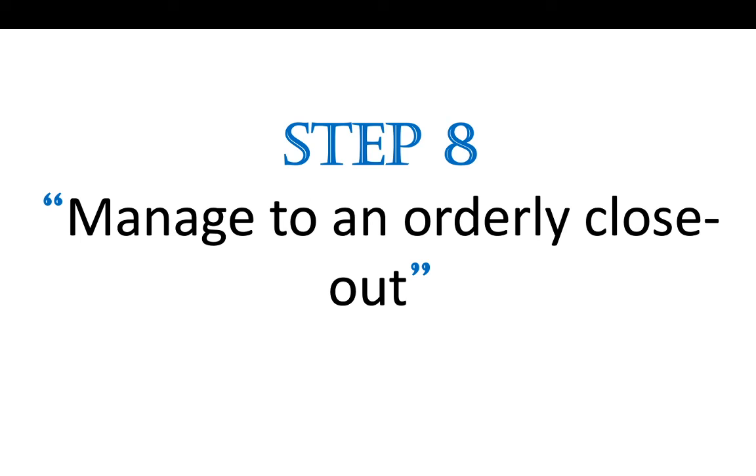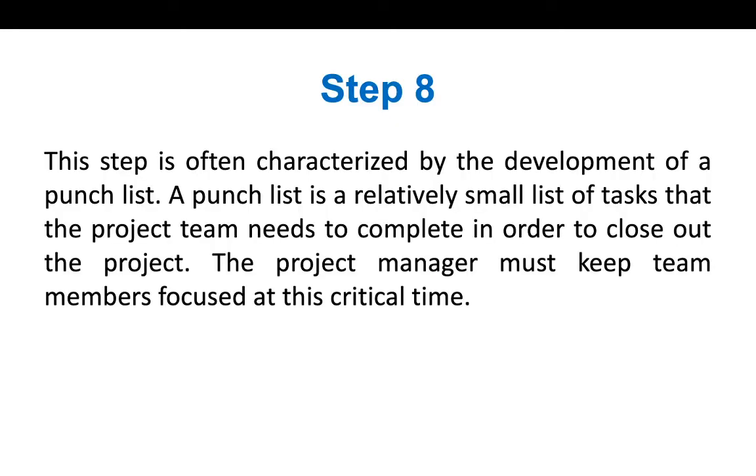Step 8, manage to an orderly closeout. This step is often characterized by the development of a punch list. A punch list is a relatively small list of tasks that the project team needs to complete in order to close out the project. The project manager must keep team members focused at this critical time.